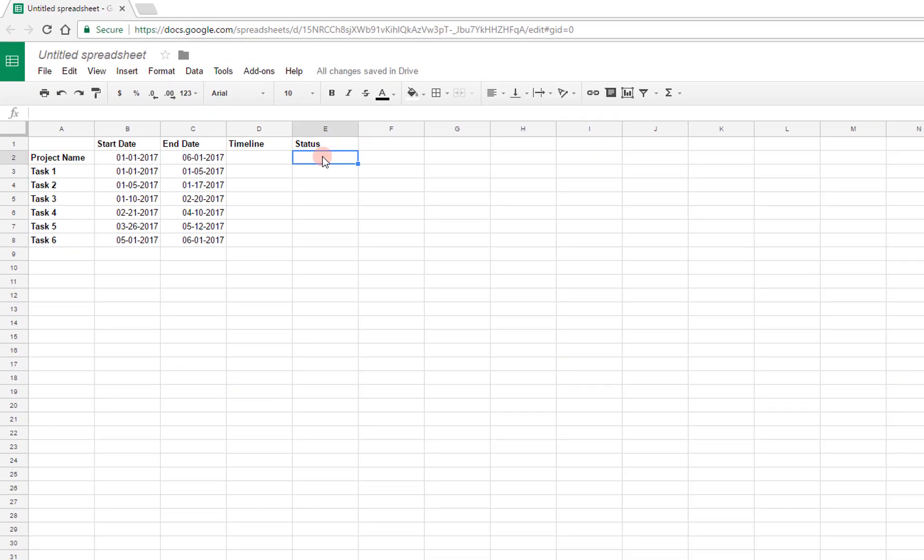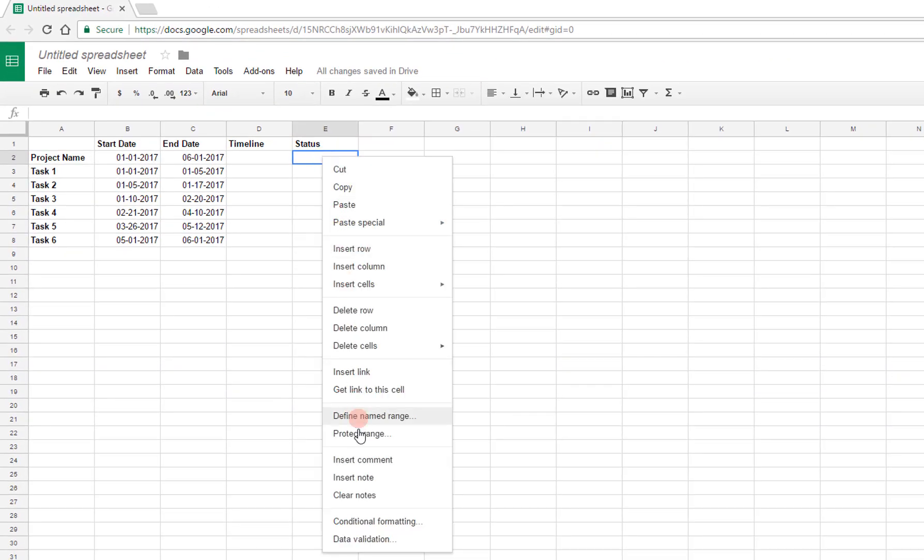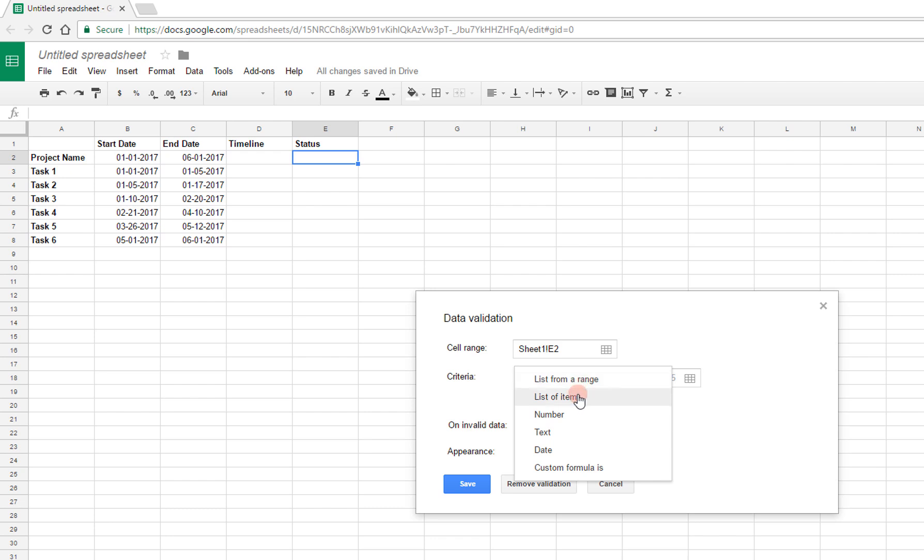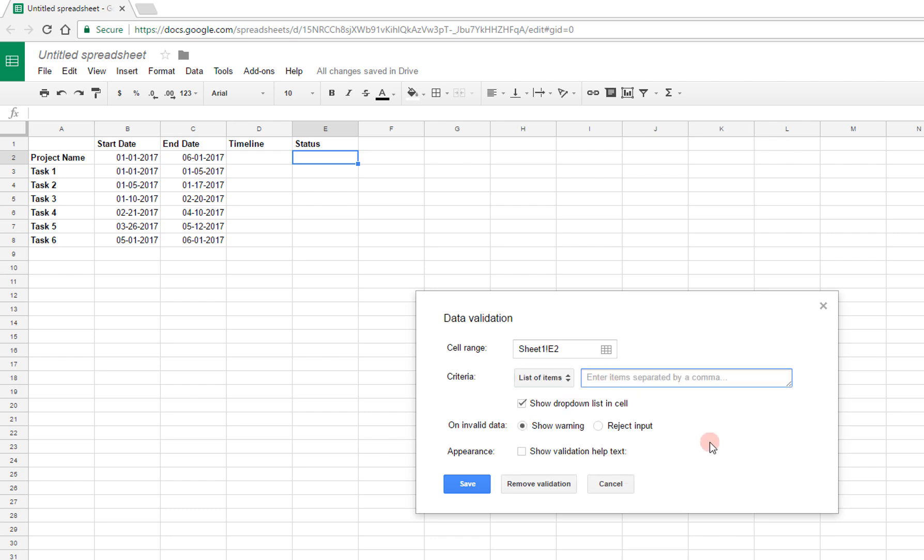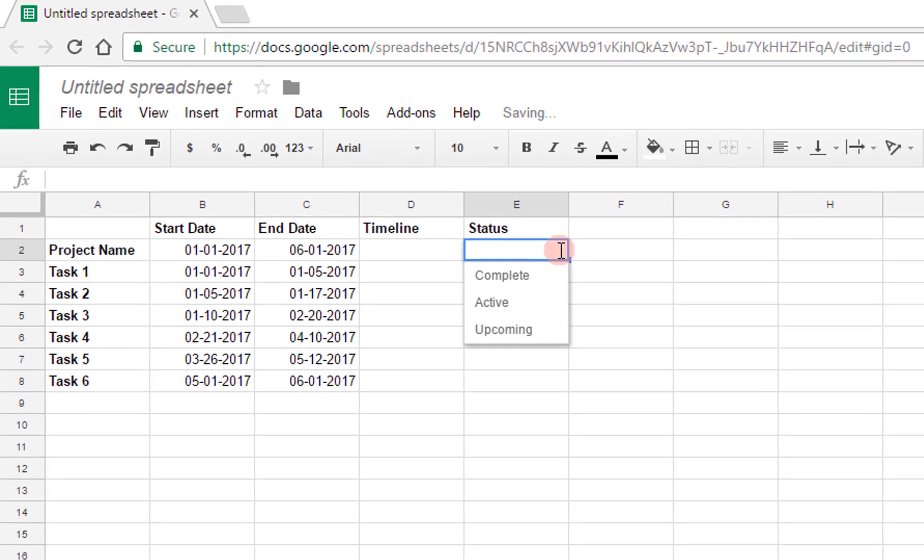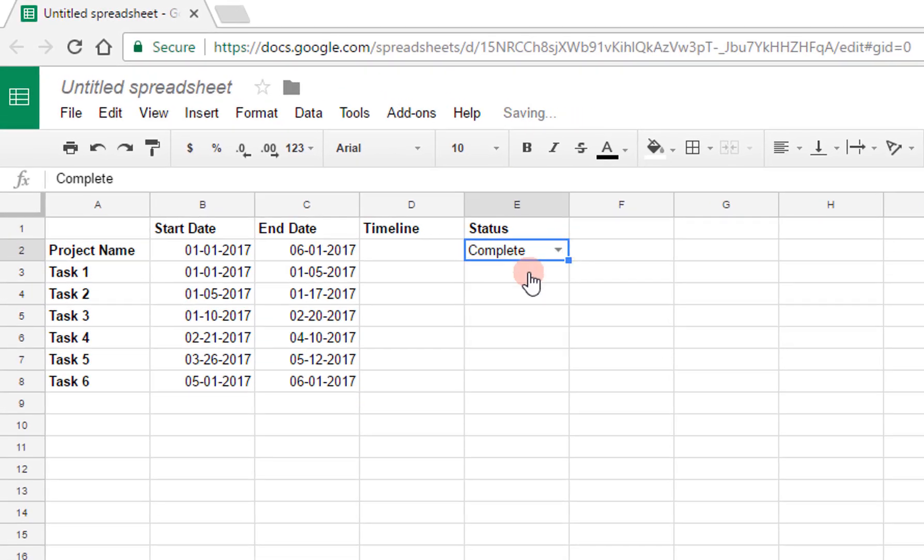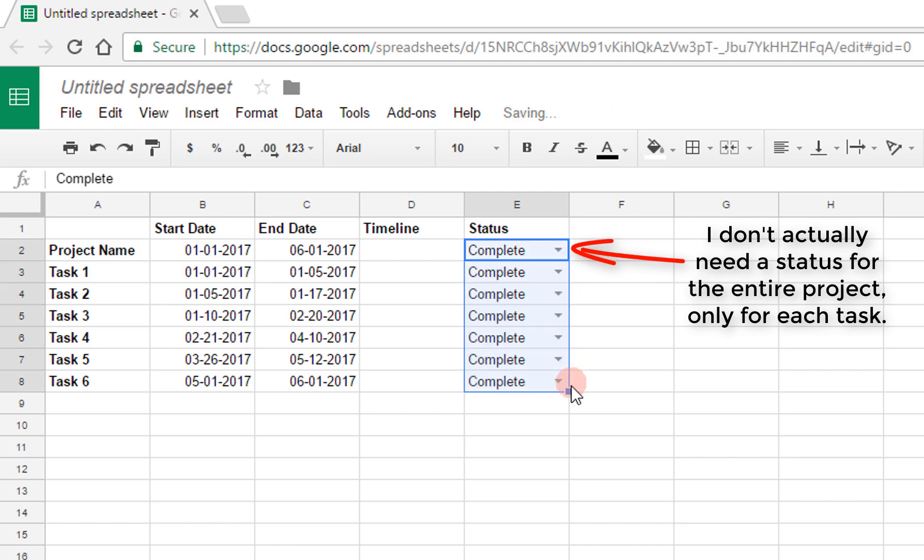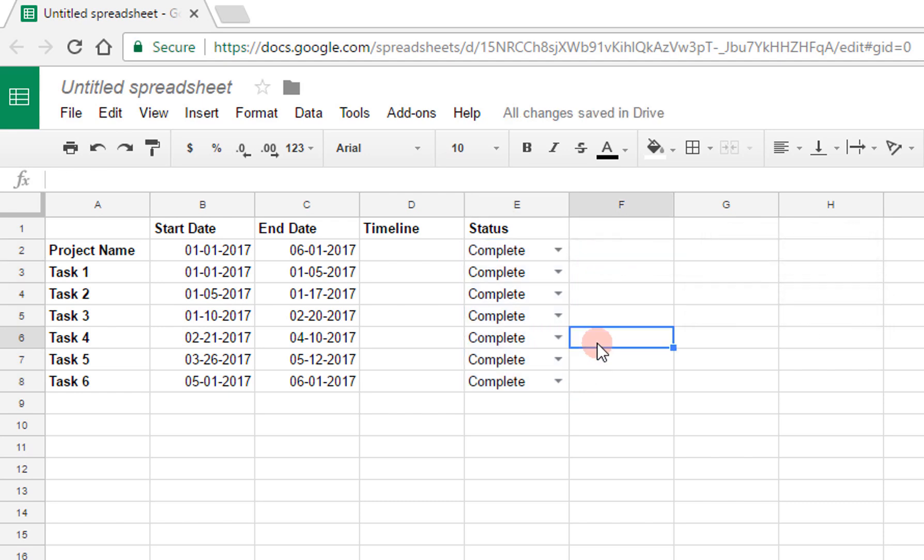So to make those my options, I'm going to right click on this cell, click on data validation. The criteria that I want will be from a list of items: complete, active, and upcoming. I want to show these as a drop-down, so I'll say save. Now I've got these options, so I can choose complete, for example. And to spread this to the other cells, I'm going to drag this formatting down. So then I have this drop-down for all of these tasks.